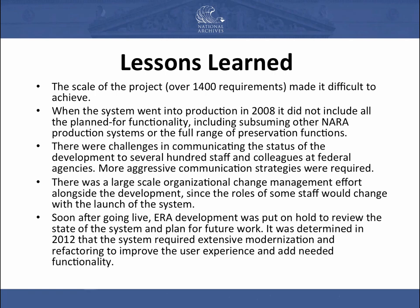But I would not say it was a 100% successful project and we learned some lessons. We had over 1400 requirements, which meant it was very difficult to implement the system on schedule and bring all functionality into production. One area not fully put into production were the digital preservation functions. We had communication challenges and a lot of change management challenges, introducing new processes for NARA staff and staff at over 200 agencies. In 2012 we put development into a holding pattern and made plans for future work, but stopped all work.